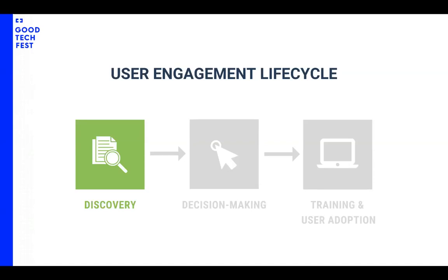Thank you. Yeah, so for us, we did realize that it was key to get everybody on board during this process. And so we had to engage our key stakeholders, the schools, the community volunteers, who are also the end users. So it was important that we have discovery meetings with them at this stage to get more insights into the challenges they were facing with regards to capturing and sharing data with us, and get their perspectives of the technology itself, and just to map out what their expectations were.